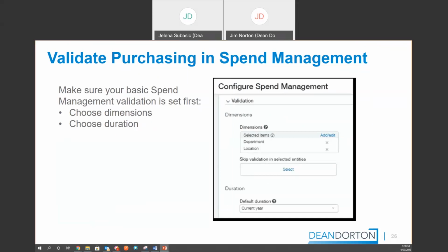Because if you have $100,000 as a budget in professional services and you just put $7,000 a month for certain months, maybe $10,000 in others, whatever you need to do to make it come out to 100, you're going to have to deal with budget versus actual within the given month if you're still not over budget for the year as a whole. So just think about what time period matters when you're validating.